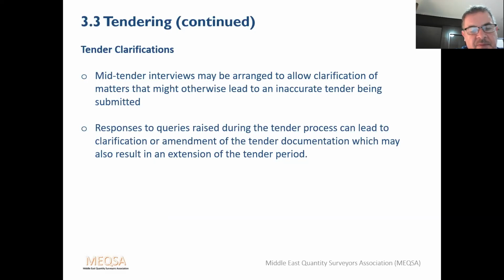Now the intention of the mid-tender interview is that the contractors have had some time to look at the tender, and they may have some common questions, or maybe the client just wants to clarify some aspects of the project. And the whole point is to lead to an accurate tender being submitted. There's not much point if the contractors don't understand what they've been asked to price. So it's in everyone's interest to make sure everyone's got the best information possible.